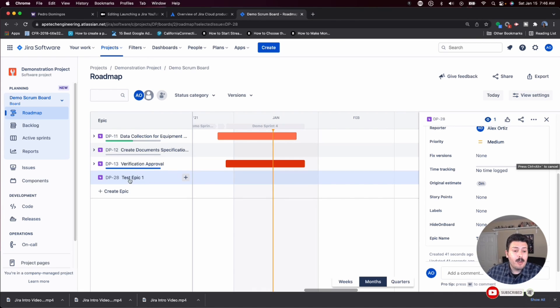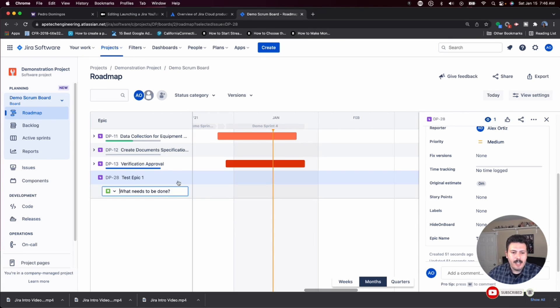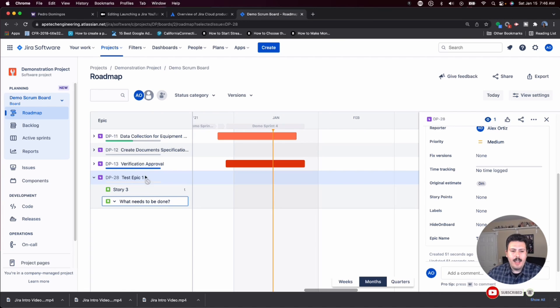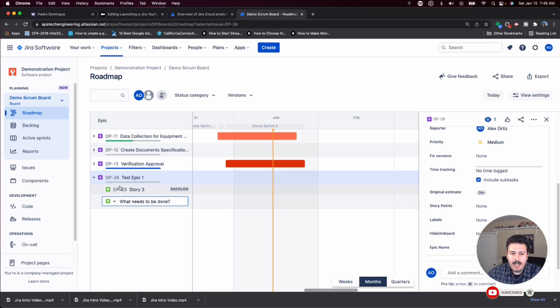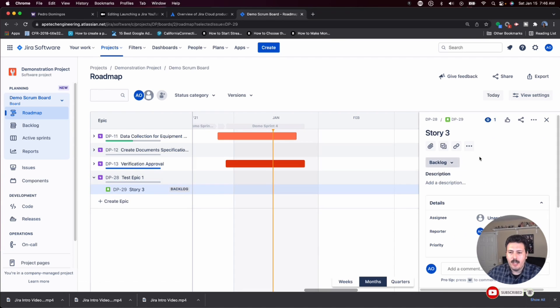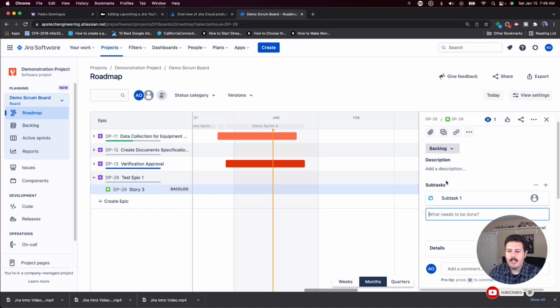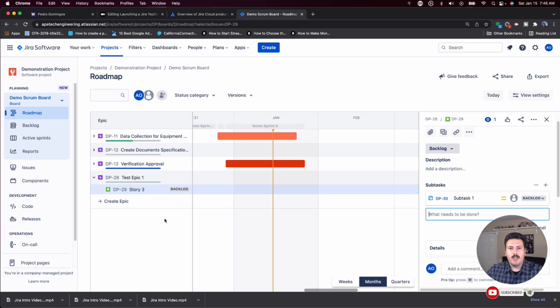From here, you have your epic, you don't have to go and create your stories, tasks or bugs independently. You can actually just click this little plus sign and now you can select whether you want to do a bug or a task. Now you can do story three and that's pretty much it. If you wanted to create a subtask at this point, you can go into any issue and click on the create subtask here. You can do subtask one. It won't show up here, but in the fourth view or the fourth method of creating an issue, they will show up. So let's jump into that one.